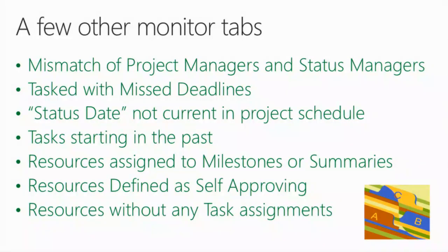If you miss deadlines, you can create a list of missed deadlines with a SQL statement, and then have an email sent out to somebody. I'm a big fanatic of status dates. If status dates aren't being updated each week, project managers aren't doing their job with the dynamic schedules to make sure they push unfinished work up. It's a good practice, and it makes your PMO more effective.